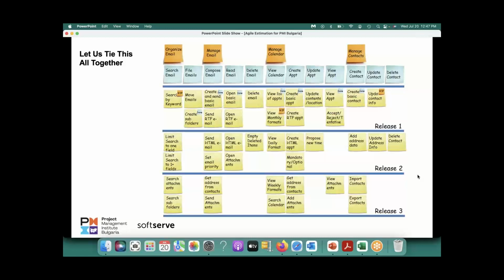from each team member during the planning for that two weeks. You don't have to take a commitment for the whole project. Take a commitment from whoever your part-time resources are, but don't take the commitment in terms of time. Take commitment in terms of, will you be finishing this? Do you commit to finish this? Because this is the planning we are doing, and we know you are only 40% assigned here. And if they do not commit, then don't include that in your sprint goal.